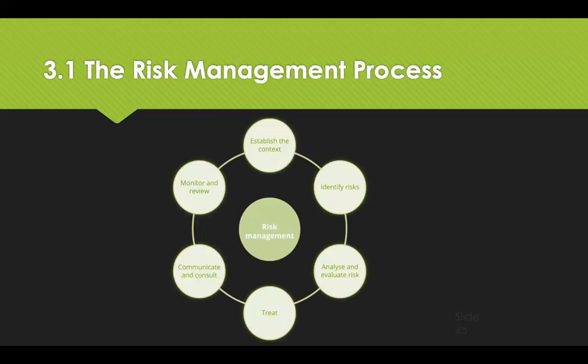The Australian Risk Management Standard 4360 was one of the first risk management standards to exist. And there are 6 stages in the process, which is similar to those in ISO 31000. This is what you can see on the slide. So the first step is to establish the context. Define the scope for the risk management process and agree the criteria against which risks will be assessed. And the scope within the organisation in terms of its strategy or its project objectives.